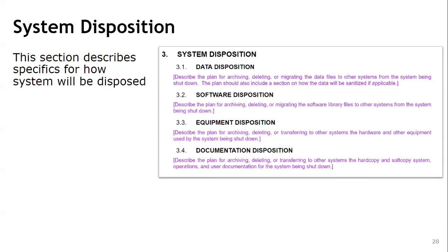So for instance, in our case, again, we are implementing a new electronic medical record system in our hospital. There was older software, which is SmartCare. So before we start to implement the new system in the medical record unit, we have to migrate the data from the older to the new one, so that later we can dispose of the data.